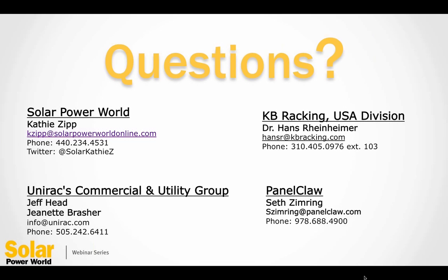The price will not come down like the panels did in the last few years, but that's for other reasons. It will come down somewhat more, but really, if you're looking at purely the price of the racking, you may pay 5 cents more and save 20 cents on the installation. Well, that's a no-brainer. So that's what you're going to have to look at. And unfortunately, there's no easy tool for that. You're going to really have to dig in.